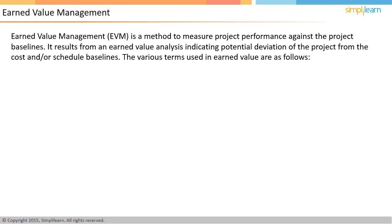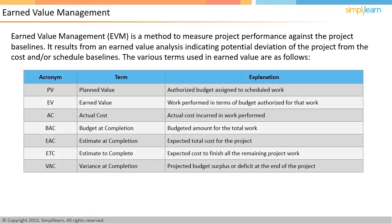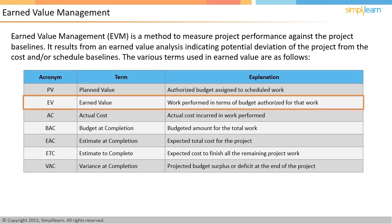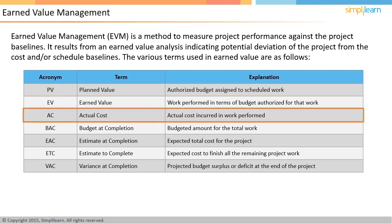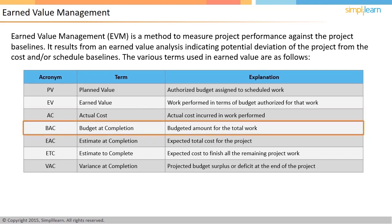The schedule baseline is the first approved project schedule along with approved changes. There are various terms used in earned value technique. Planned value is the authorized budget assigned to the scheduled work. Earned value is the work performed in terms of the budget authorized for that work. Actual cost is the cost incurred in the work performed.